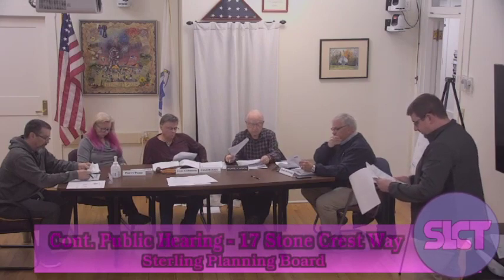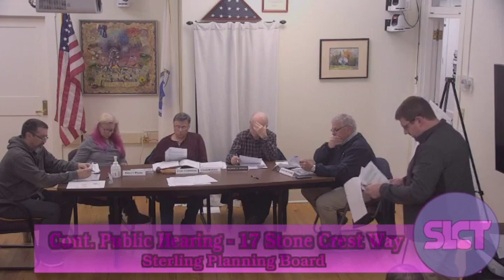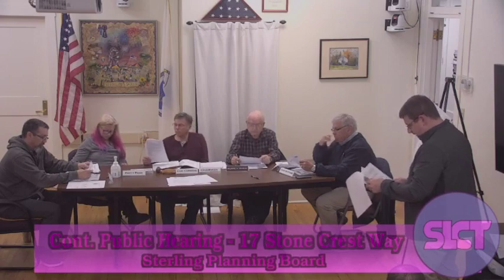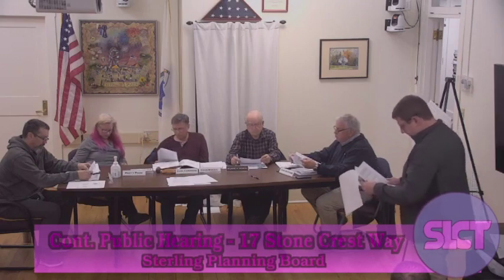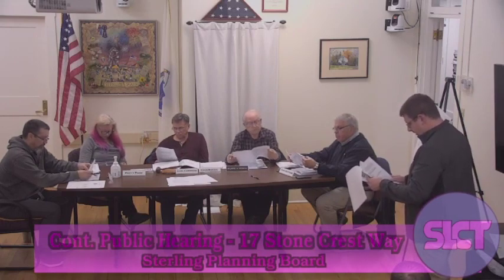GEI has no issue relative to compliance with Standard 8 construction phase erosion controls, sediment controls, and pollution prevention. During the design for future final development, the pre-development conditions will need to consist of those conditions prior to earth removal activities, that is, woods, ground cover, not bare soil. January 18th, 2024. The engineer has provided a stormwater report, which has been reviewed by GEI. Please refer to the additional comment sections below. And then GEI's March comment: as previously further explained below, the revised hydrology computations are in order and compliance with Mass DEP stormwater standards is reasonable. General engineering comments, number 12. GEI has no comments or issues at this time, and they reiterate no further comment necessary.